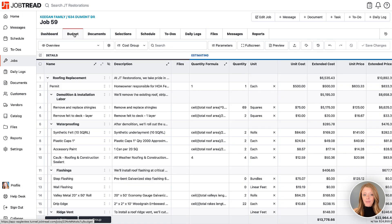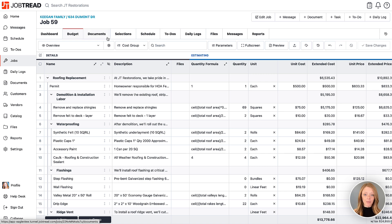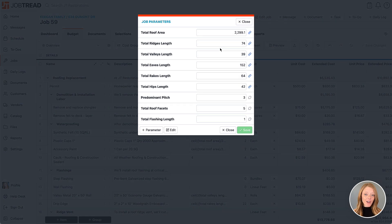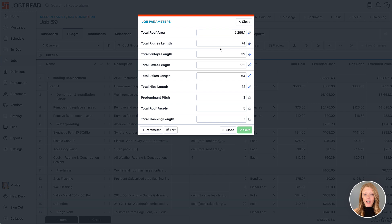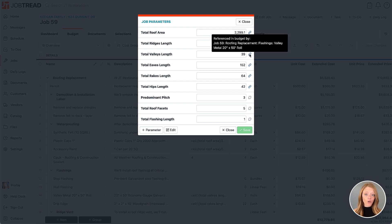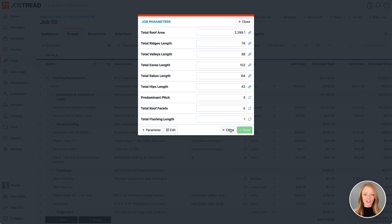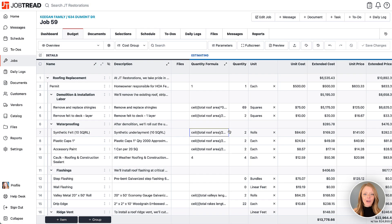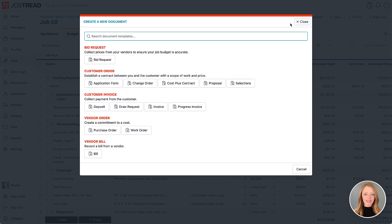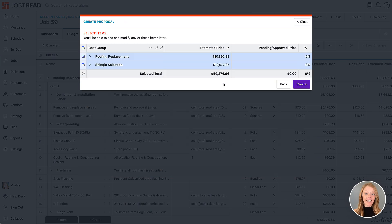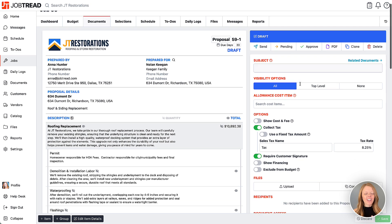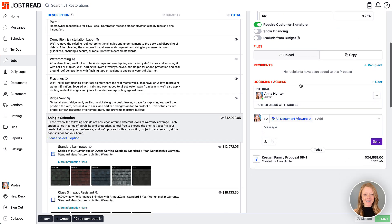Now you will see the measurements when you navigate to your job budget and open up your parameters. I already have some formulas in my cost items to calculate the quantities for my takeoff. So by hovering over the link icon next to the parameter, I can see which cost items have referenced this parameter in my budget. Referencing Eagle View measurements within my formulas makes estimating exterior projects quick and easy, leaving no room for guessing.